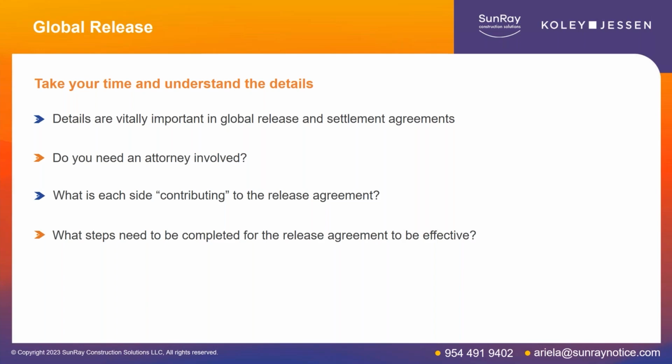And then consistent with what Taylor was saying earlier, you want to allow yourself time for that payment, if it's not in certified funds, to clear your bank account. So then you want to say that I've got 2 weeks from the date that you receive payment until I have to have the lien release on file, or have the agreement drafted that you're not required to release the lien until you've received notification that the payment cleared your bank account.